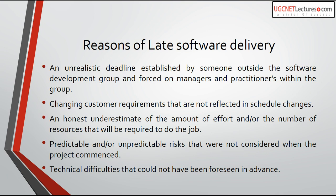Sometimes customer requirements change while the project is being developed. If customer requirements change, you have to schedule those changes too and reflect them in the schedule. If you don't update the schedule according to new requirements, you will miss the deadline — the project becomes bigger because you have to add more functionality, but the schedule remains the same, causing it to go beyond the deadline. Another reason is underestimating the amount of effort and number of resources required. If you underestimate the number of people needed, the project will take more time.